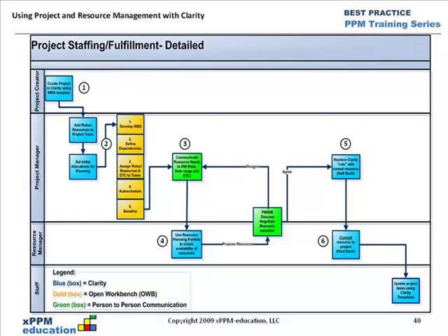And then assuming that it's acceptable and agreed to, then we move over to item 5, where the project manager will now actually, using the resource finder, replace that role. And in the case that we'll do first, we'll do the architect. You'll replace the architect role with the named resource. And that process will replace the allocation, and it will actually replace all the tasks and ETCs from the role to the named resource. And that all happens in number 5, but it's left at the soft book state.